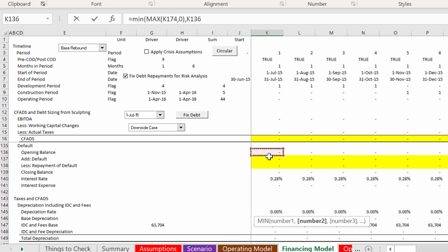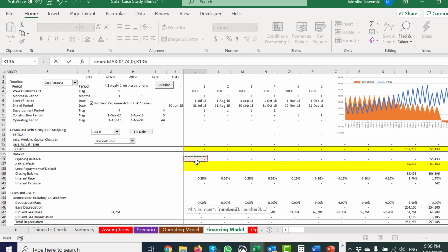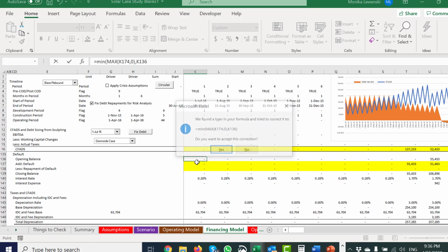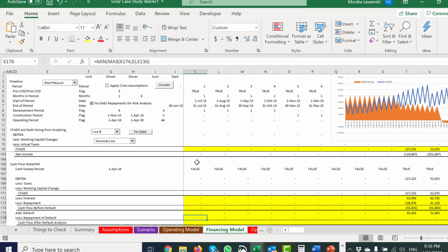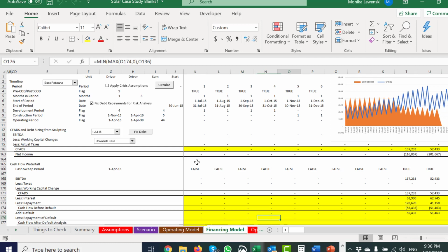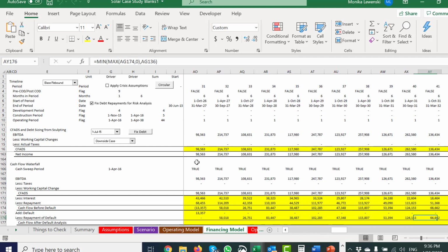And that's why I almost need... finally I got this. I've got a headache right now. But you need an opening balance on the default for this test. If you plopped your default into the big, regular old opening balance, closing balance for our senior debt or whatever, that wouldn't work. You need a second one because of exactly this. Finally, I understood it by going through it. Thank you for making me make a video, as if anybody cares. And then, we repaid the default, which is really good news.